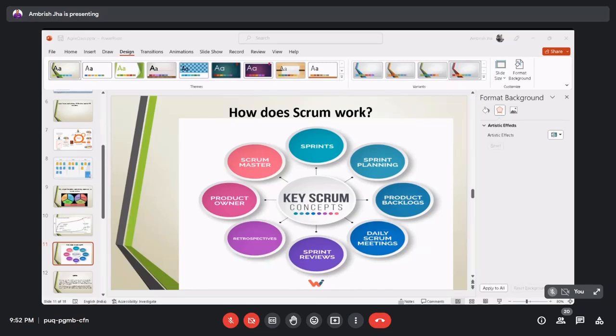We also have separate formats or trackers for the sprint, in which we put the level of effort, LOEs, how much buffer we have, and how much strength we have. For example, in a sprint, in a team, we have 7 people, and we will work for 15 days.